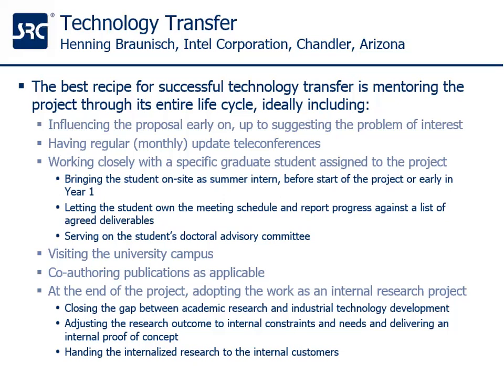I've had a few students that were really great about it. We tell them, okay, our goal here is to have a monthly meeting. Why don't you contact us and coordinate with your professor when we can meet? And some of them were very, very good about it. They would essentially own the meeting schedule and also have a list of deliverables. We would start out each meeting with checking where we are at in the project and monitor the progress against the overall schedule of the project. This then helps tremendously when it comes to annual review presentations.